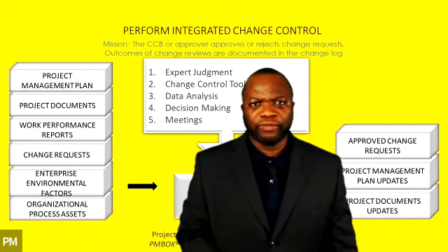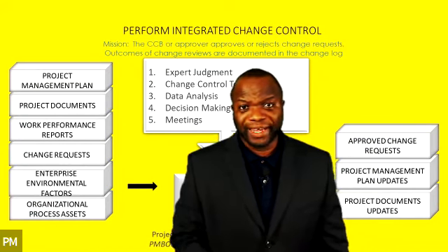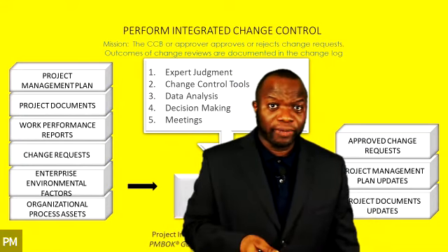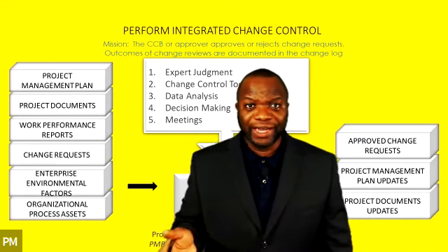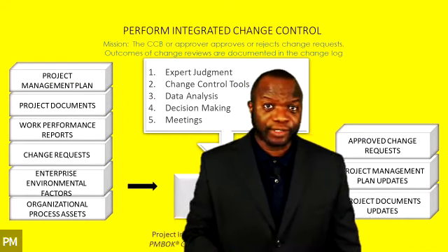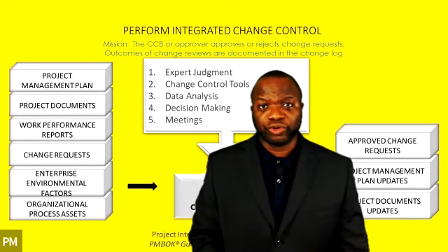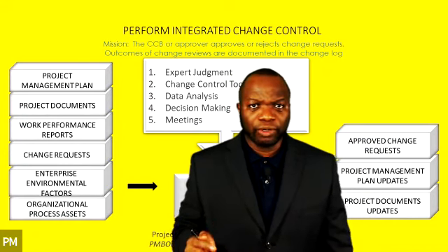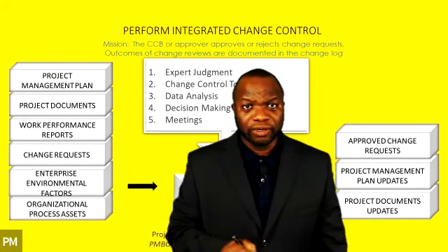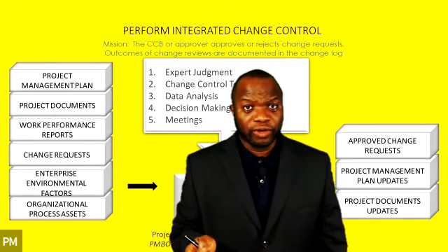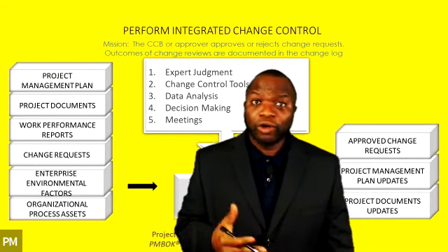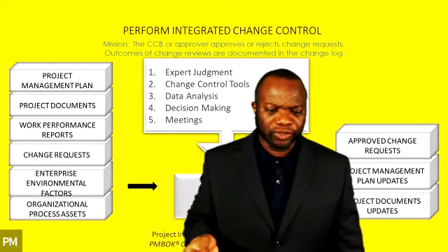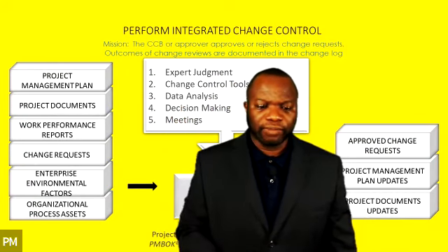For example, in a previous company, part of my job was implementation of a change management tool known as ChangePoint. CompuWare made that, and we used it to move IT service requests around. That's an example of a change control tool. Many of them do exist. It's like a virtual roundtable where you're passing the request through a series of steps, going from functional head to functional head, or change control board member to change control board member. That's really what it all is. So keep that in mind.